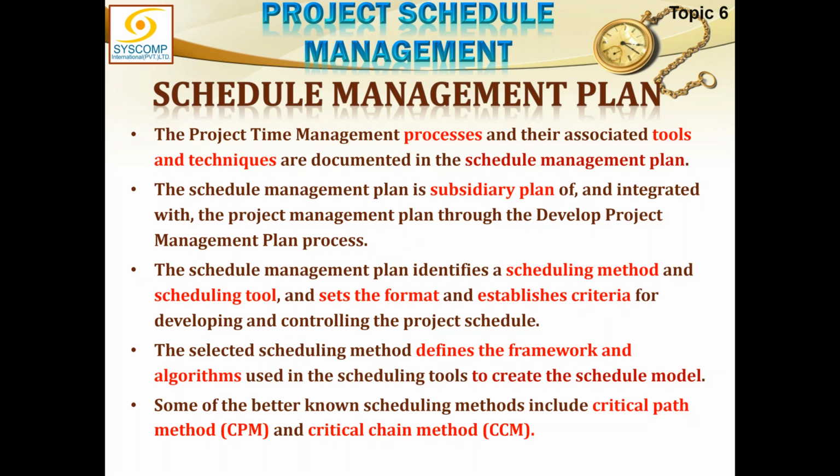As we have already talked about, the methodology and all the tools and techniques and all the rationale guidance for the schedule management of all the various processes is actually defined in the schedule management plan. And the schedule management plan is a part of the project management plan. It is ultimately going to be integrated into the project management plan. The schedule management plan identifies a scheduling method, as I said, a scheduling tool, a set of formats, some established criteria for developing and controlling the project schedule. So all these guidelines are to be provided there.